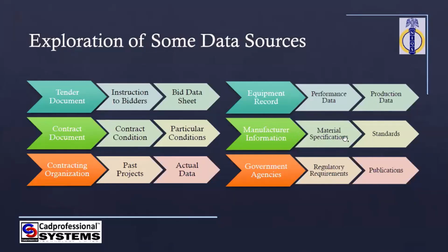And of course, there are specifications that have to guide them, and those specifications relate to standards that have been established. And finally, on our list this evening is government agencies, some of whose rules we get from regulations and requirements. We talked about one of these yesterday, whereby I introduced to us, because it was obvious that a good number of us don't know, that VAT for construction activity is actually 2.5% now. So these are some of the things that we covered yesterday.